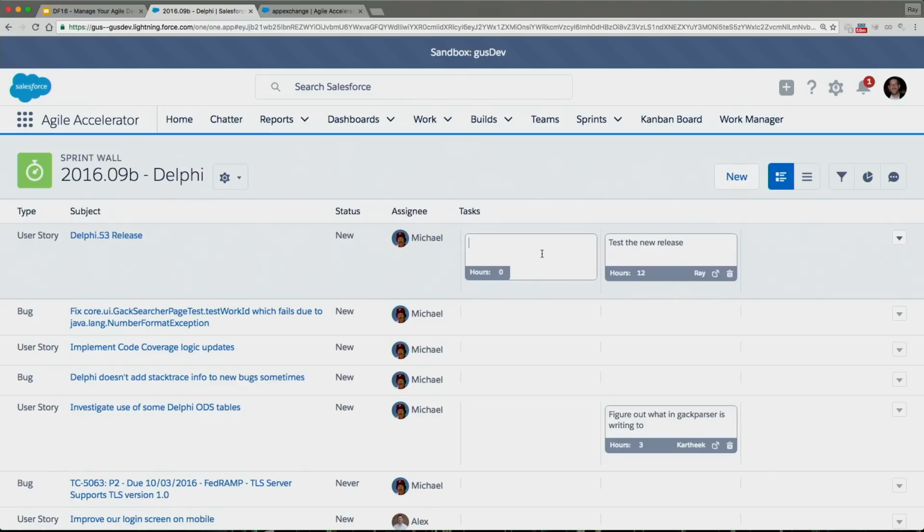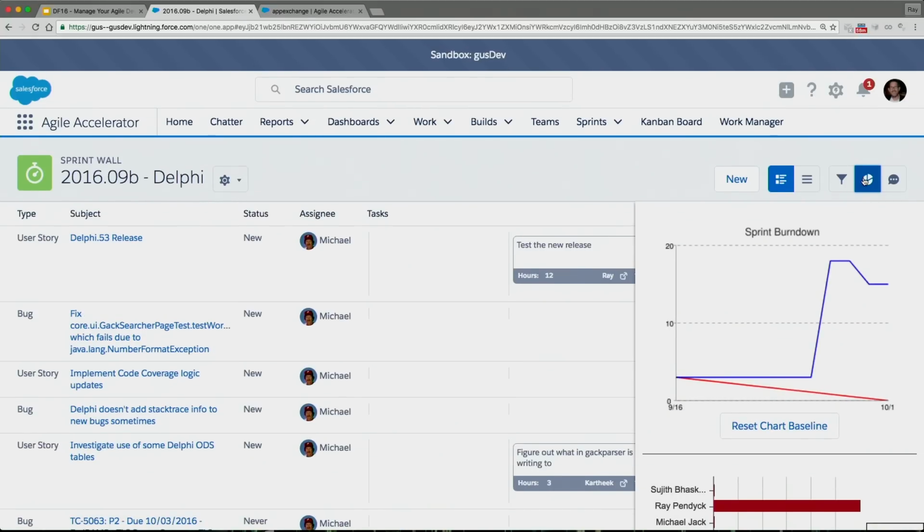But it happens, it's a necessary evil, and that way we can actually set the hours in a workday. Most teams will use 6 hours a day. Even though they're in the office and working that much longer, that's how many hours you have to actually get heads down work done. And we track that, so you know at the team level how many hours you have, and that allows us to start building some nice charts to warn you how many hours you have available.